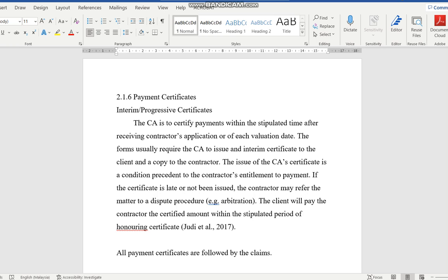If it's BQ, then it's together. It's like a BQ contract already, together with the rest of the other items that are also not sure. That is by measurement already. The entire contract is by measurement. But when you have a fixed amount of work, and only one portion is considered as remeasurement, that is provisional sum. Contingency sum is the amount that the client will set aside if they need to do variation work, if they need to add on.